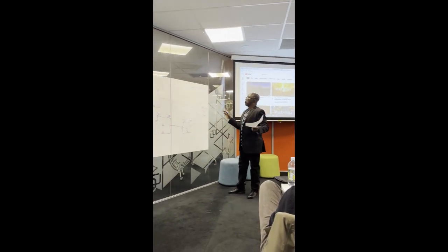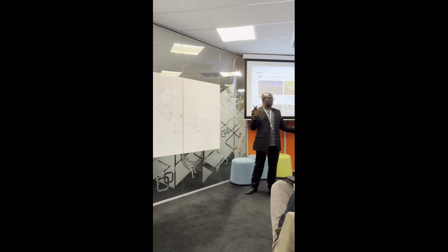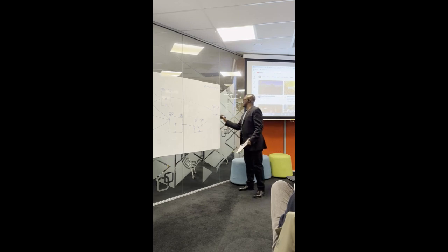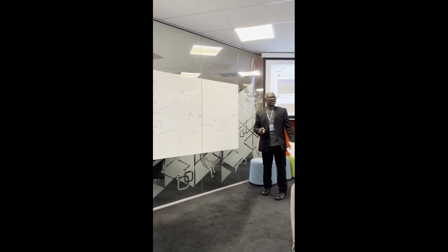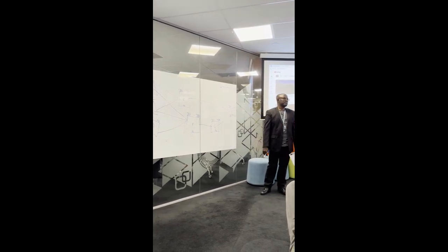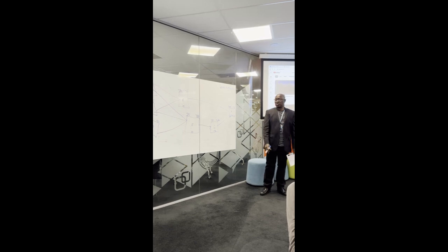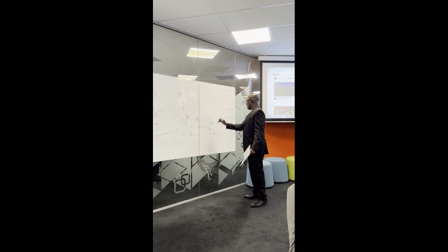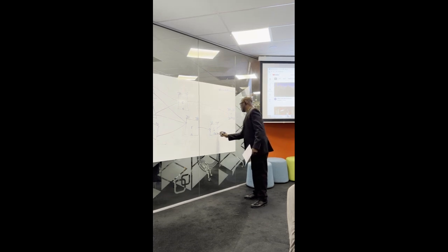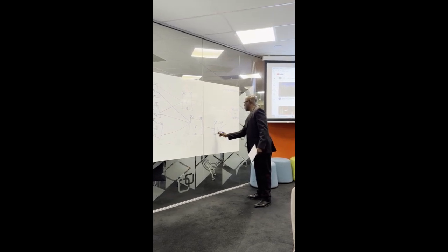Now we've calculated forward. We are moving backward now, right? We just drop this down. The formula is there, I can't remember it again. So we put 235 minus 35, which is going to give us 200, right? Are you getting it? Yes. It's going to give us 200. Now we're moving down, because this and this are connected. We put our 200 here, minus this, which is going to give you 30, right?